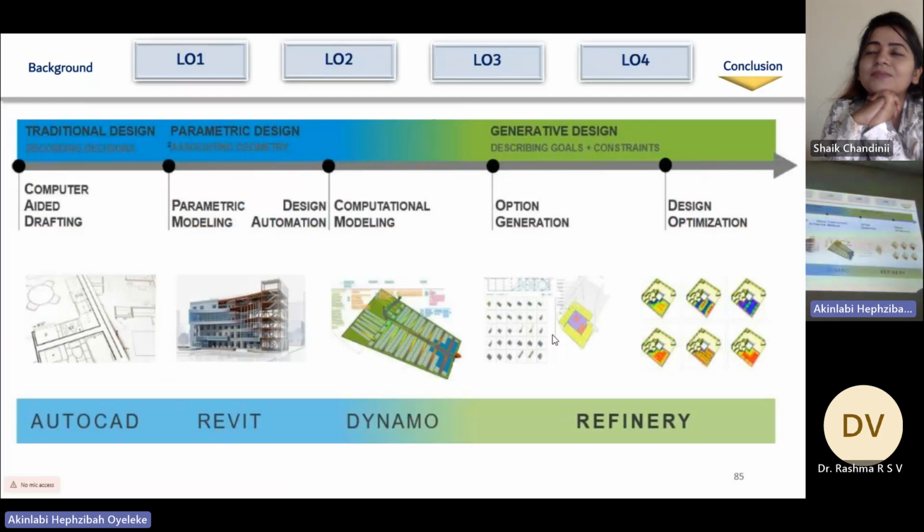Two problems. One was at the foundation stage, and they did not anticipate the watering problem and the soil nature. The other thing is, in the cost of the project, they did not anticipate the budget for the project because they did not use BIM. So at some point in the project, they had finance problem, and they had to source for alternative source of funding.